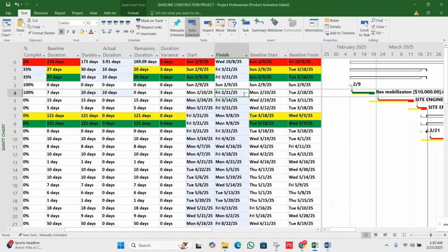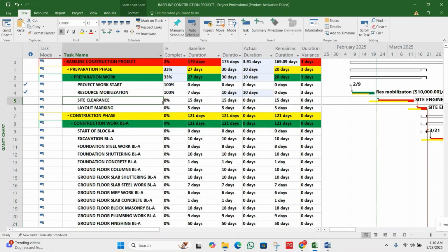Start date and finish date you can see has been changed. According to the baseline, you can see here it should be complete on 18 Feb. Okay, so this task has been updated, and baseline you can see will not change. That's why we always say the baseline is the fixed reference point to measure the project progress. So now, first we have updated the duration. Next step we will update the actual resources, manpower, material, machinery, and overhead expenses.